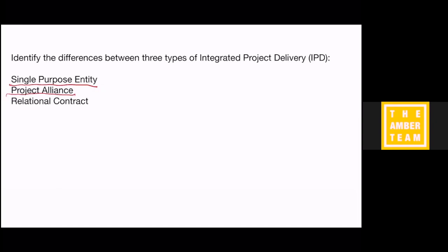If we can get this project less than 500, then you're going to get $50,000, and the contractor is going to get $70,000 as a bonus. Well, what does that mean? Well, that means it's not enough for you to just say, oh, it's green. You're on the hook for making sure that if you're going to make a profit, you dot all your I's and cross all your T's to make sure that this facility is actually energy efficient, because your profit depends on this in this model.